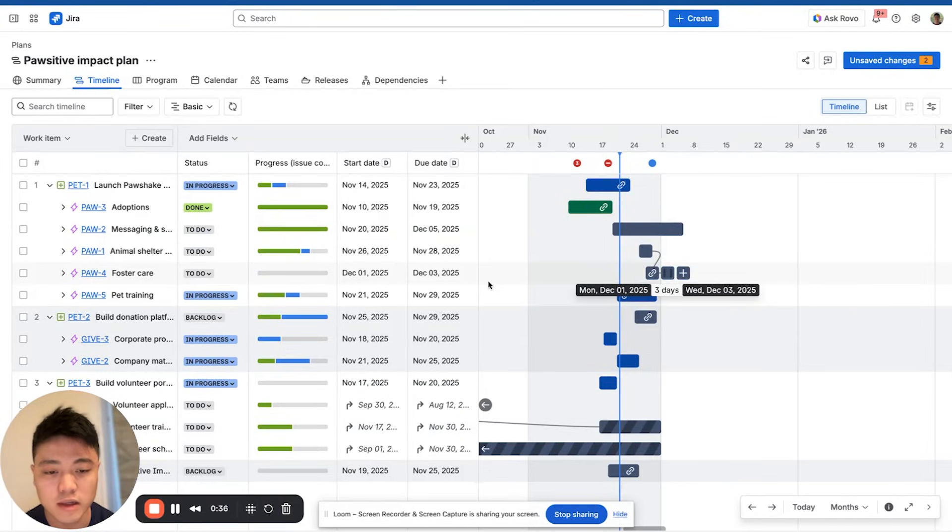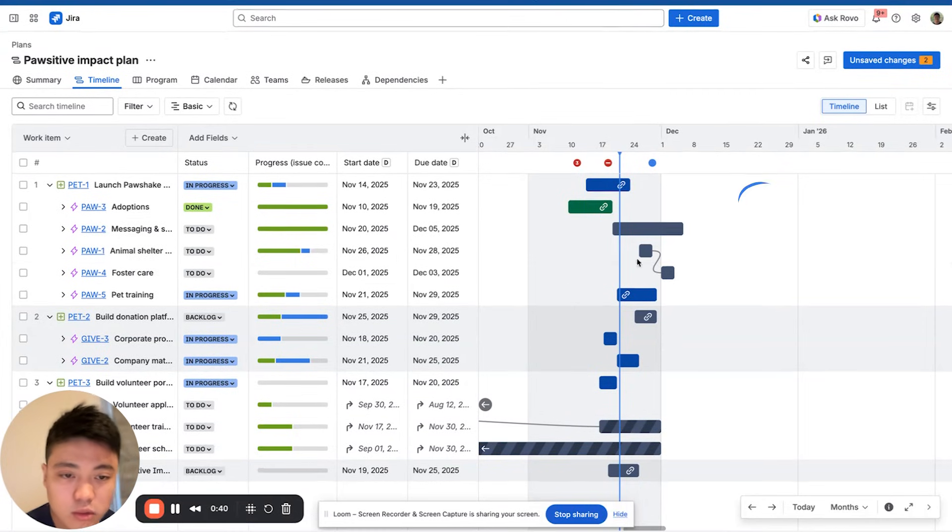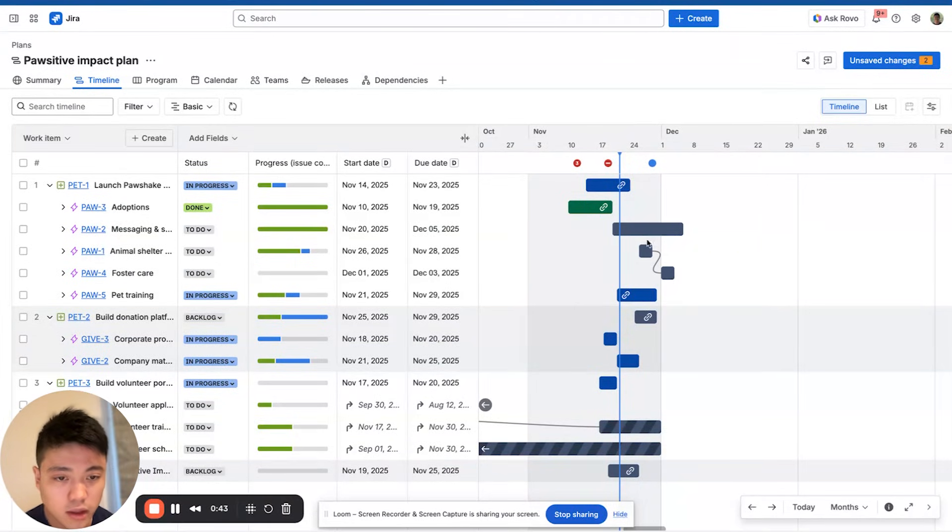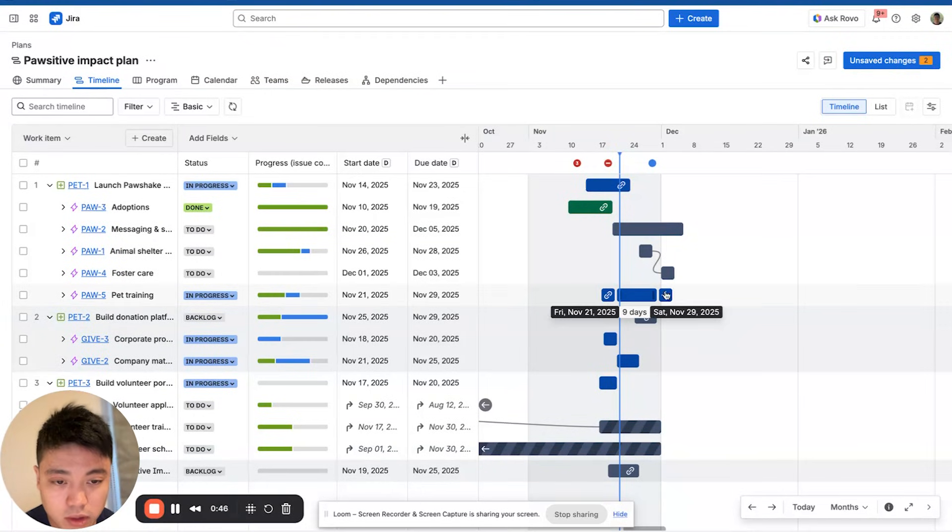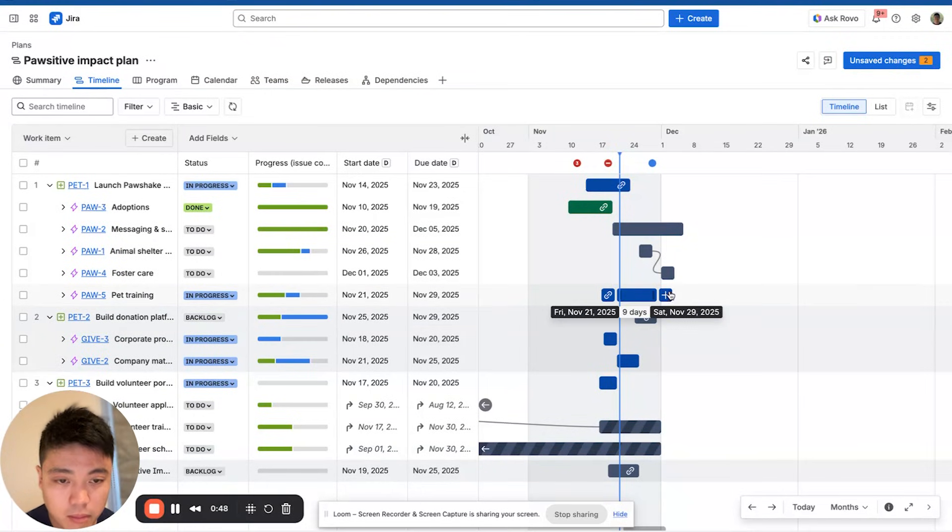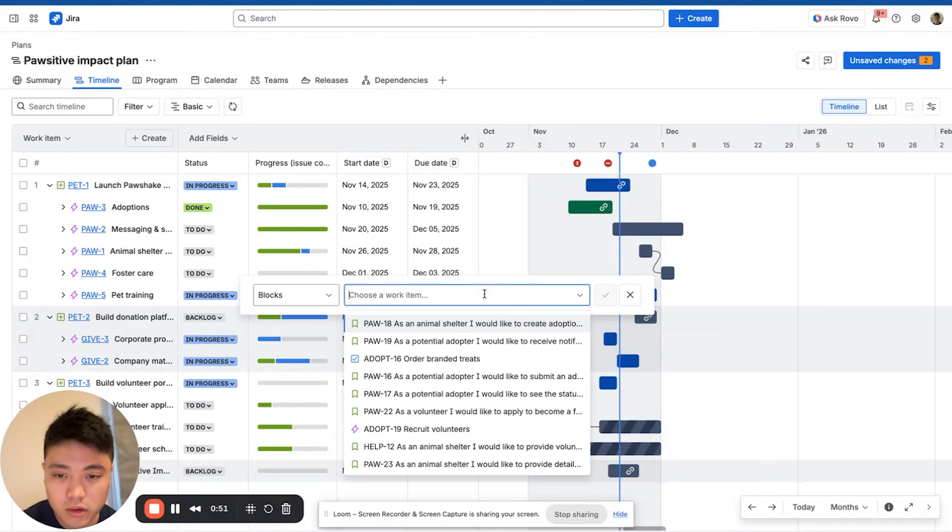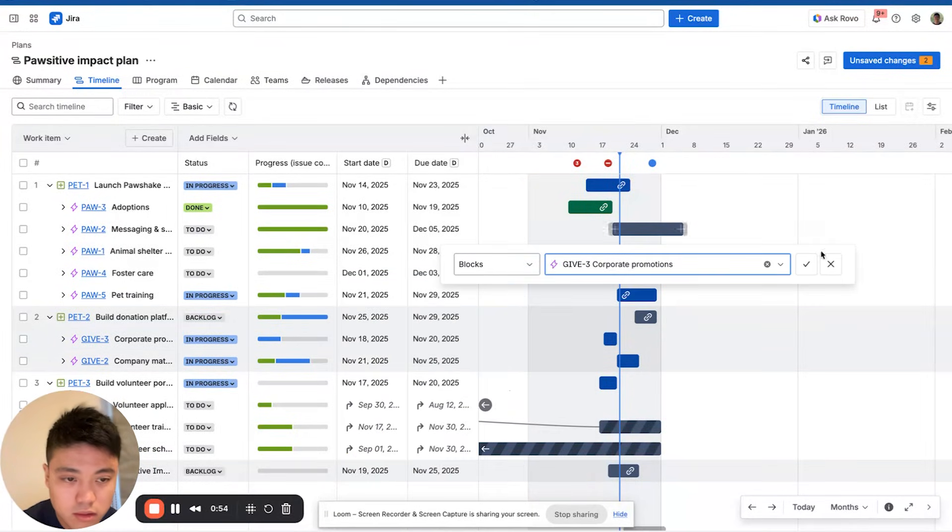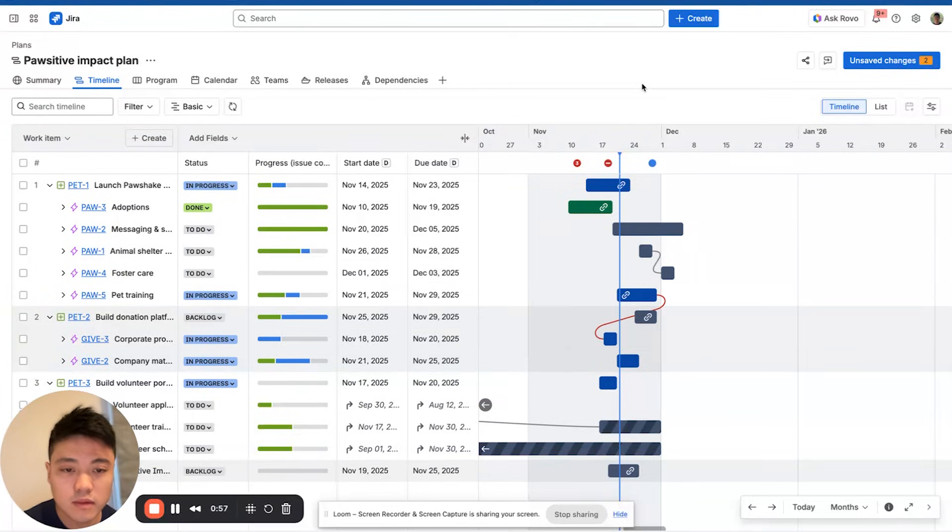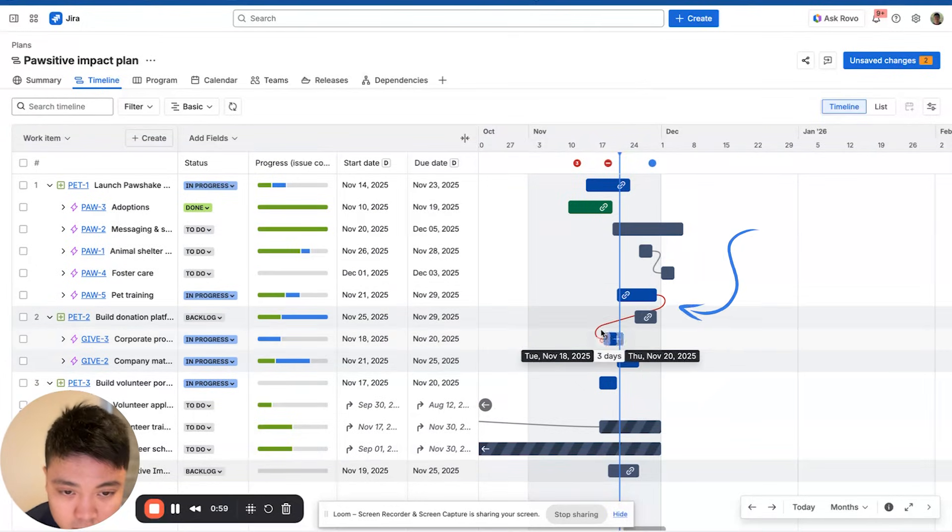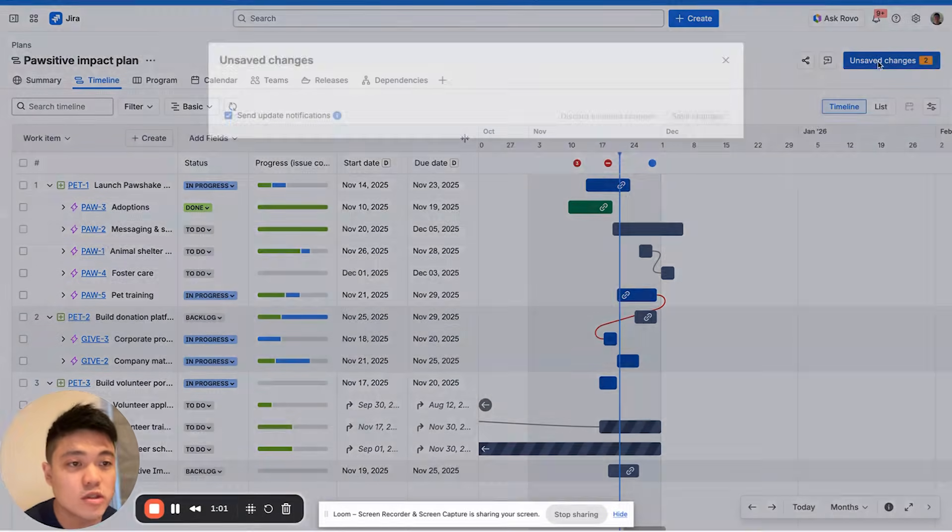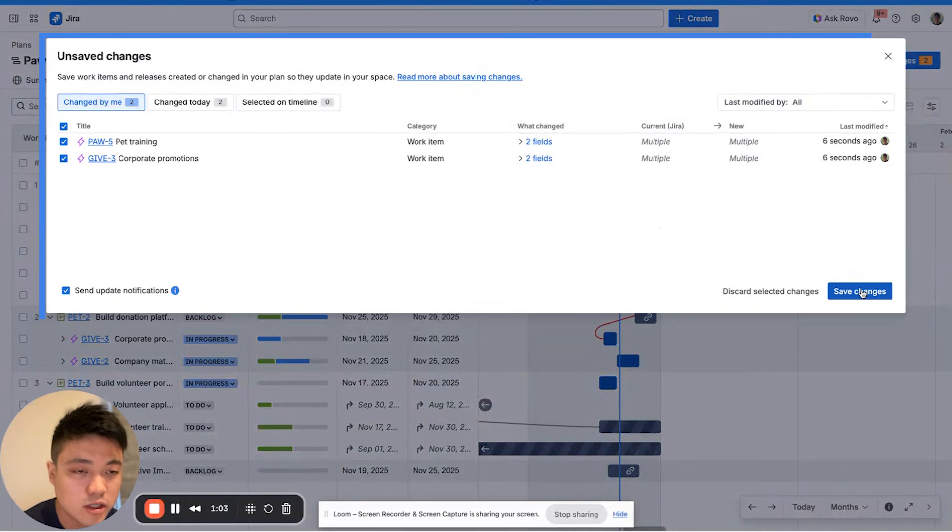In the timeline view, you can see how work is connected across your plan through these arrows and lines. You can actually map them on the timeline as well. For example, I'm going to map POR5, this task here, across to another project, to this epic called Give3. And as you can see, that dependency has been marked here. Once you've done that, you can click Save Changes.